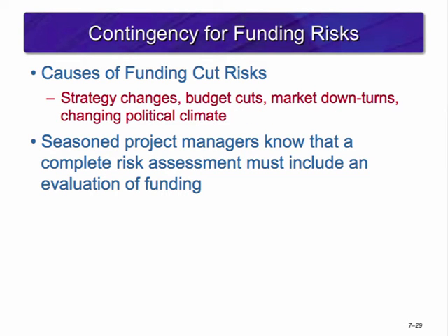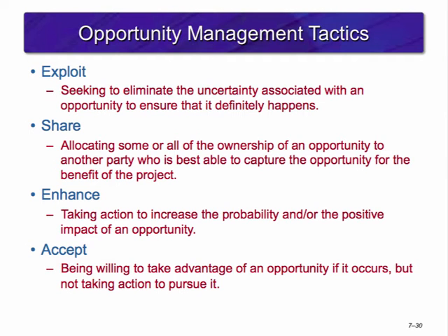There are times when the funding for your project will get cut. This could occur any time from the start of your project to the end of your project or anywhere in between. This is sometimes due to organizational strategy changes, budget cuts, a market downturn, or a change in the political climate. Seasoned project managers recognize that a complete risk assessment must include an evaluation of funding supply. This is especially true for publicly funded projects.